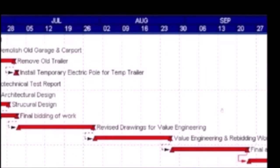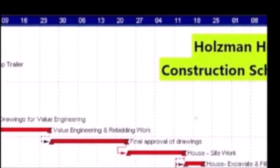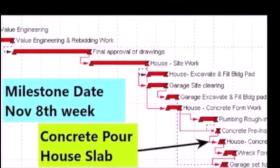At the beginning of the project, I'm starting back at the beginning for this anticipated schedule. What you should look to do is set a milestone date — we set this date a couple of months ahead of time. The milestone date was to do the concrete pour for the house slab and the garage slab, and we set the date for November 8th. That gives everybody on the job site — the plumbers, the concrete crew, your excavators — a target date to hit. It also gives everybody behind that schedule — your lumber delivery, truss delivery, your framers — a clear target: we're looking at November 8th to do the concrete pour. And so now it's established.